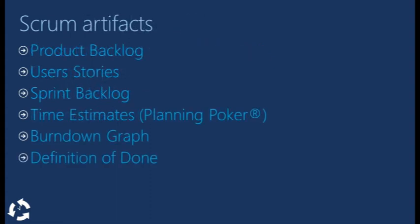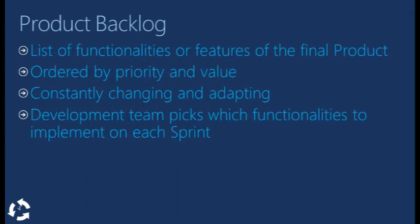Now a quick breakdown of the artifacts. The product backlog contains a list of all the features the final product should have, and it's ordered by priority and value. This priority is determined by the product owner. The backlog is considered a living artifact and keeps changing as the project progresses.